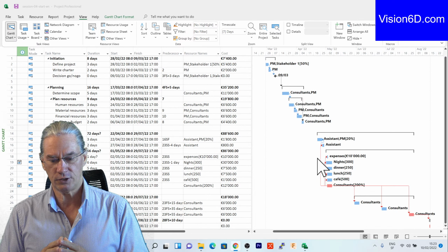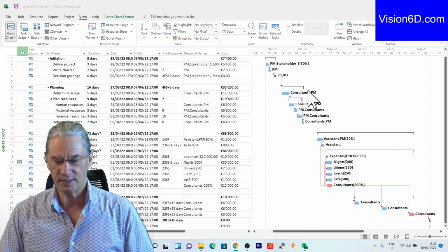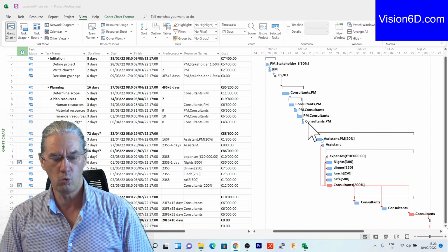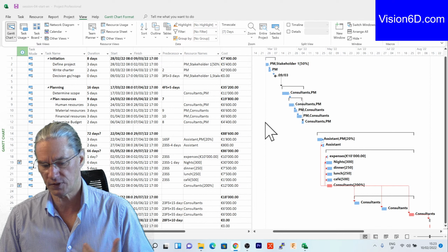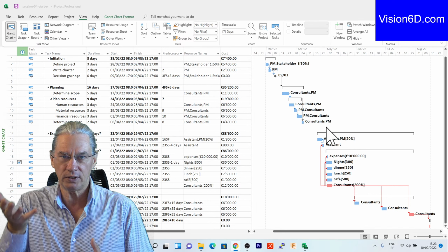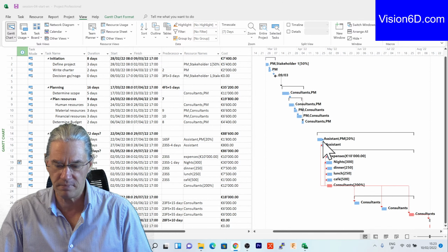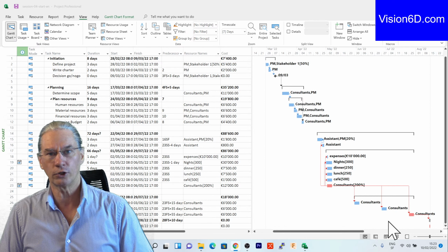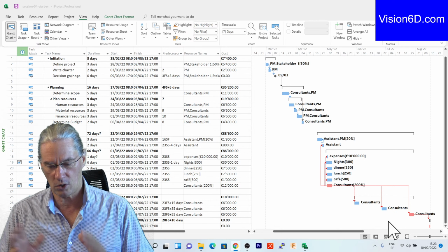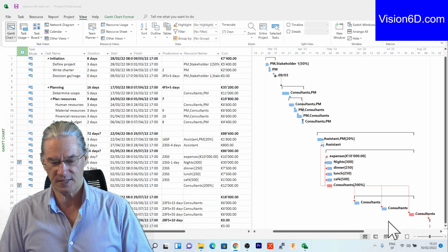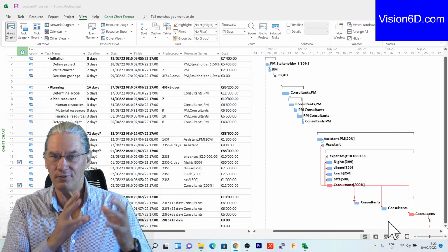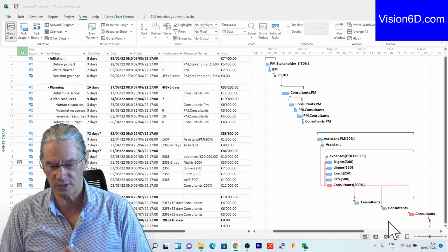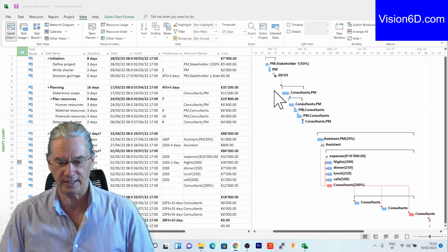The margins in terms of costs that I have are in the beginning of the project. I have here tasks that I know won't last so long, won't cost that much, but I brought them a bit up because I know that maybe later on, the consultants will have to stay a bit longer at some of the locations. So I prepared some savings of money aside, or reserves, better said, that are hidden in the costs that I have here in the beginning.